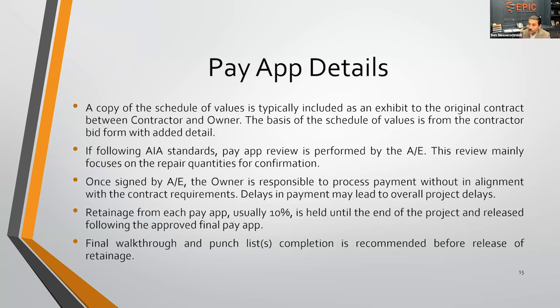That's going to be the last opportunity that the association or client is going to have a quote unquote financial upper hand to knock out all those loose ends. While it is a responsibility of the contractor to do their individualized punch lists, it is always best practice to have your inspecting engineer or architect perform the same and even work with the association, with the community, to get any detail that they're aware of.